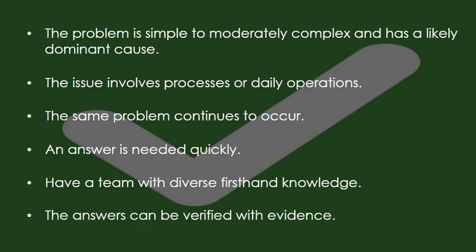And the answers can be verified with evidence. The technique is most effective when the team can validate their findings using available information such as system logs, performance data, documentation, process records, or conversations with employees involved in the situation. Supporting each answer with evidence helps the team move confidently from the initial symptom to the actual root cause.